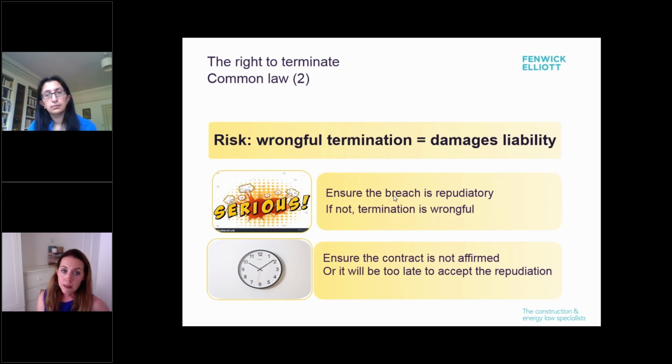Late or underpayment by the employer is quite a tricky area. Generally, it isn't a repudiatory breach, but it could be the case that the cumulative effect of many examples of failing to pay could amount to a repudiatory breach and demonstrate an intention not to be bound. Or you could get a situation where non-payment of the majority of the total sum, thereby causing harm to the receiving party, is enough to constitute a repudiatory breach. But again, in each of those cases, it's going to be very, very fact specific.